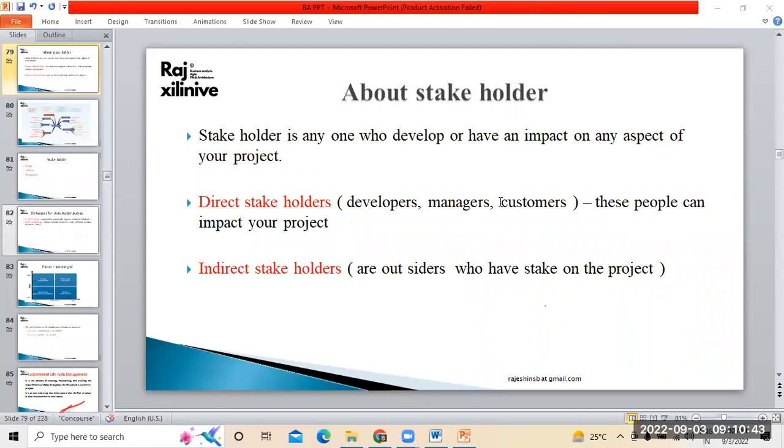I have a quick question. Go ahead. Basically, can the documenter be the BA too? Normally not the BA, because it is too much burden. The BA is conducting the JAD as well as the pre-JAD activity, right? See, why are you conducting the pre-JAD activity? Because you don't know the reality, so you cannot conduct the JAD session directly. Instead, it is always better to conduct a pre-JAD education or kickoff meeting. There you will come to know the facts.